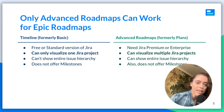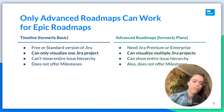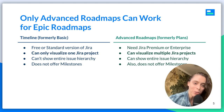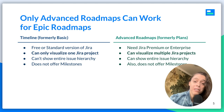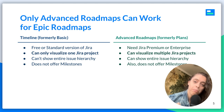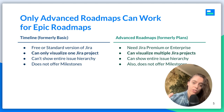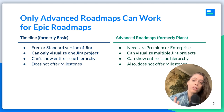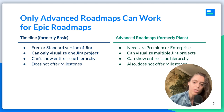We have the Timeline, formerly known as Basic — available with free and standard plans. But as you might see bolded, you can only visualize one Jira project with Timeline. That brings me to Advanced Roadmaps, formerly Plans — you need a Jira Premium or Enterprise subscription, but with one of those subscription levels, you can visualize multiple Jira projects in one roadmap. This is really the only built-in roadmap feature that helps you make Epic Roadmaps in Jira.